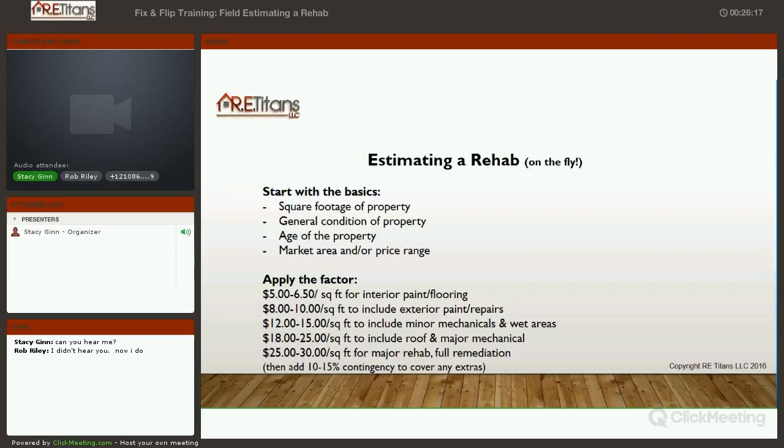I mean, is it worth the risk? Is it worth the time and effort? And we run into that where you could have two houses sitting next door to each other in, say, a transitional neighborhood, especially when you start looking at high lot values. If it's going to cost you over $30 a foot or in that range to replace that, and you can get double the price or 1.5 times the price by tearing that down and building new, there's more profit in that, and the rehab doesn't make as much sense.